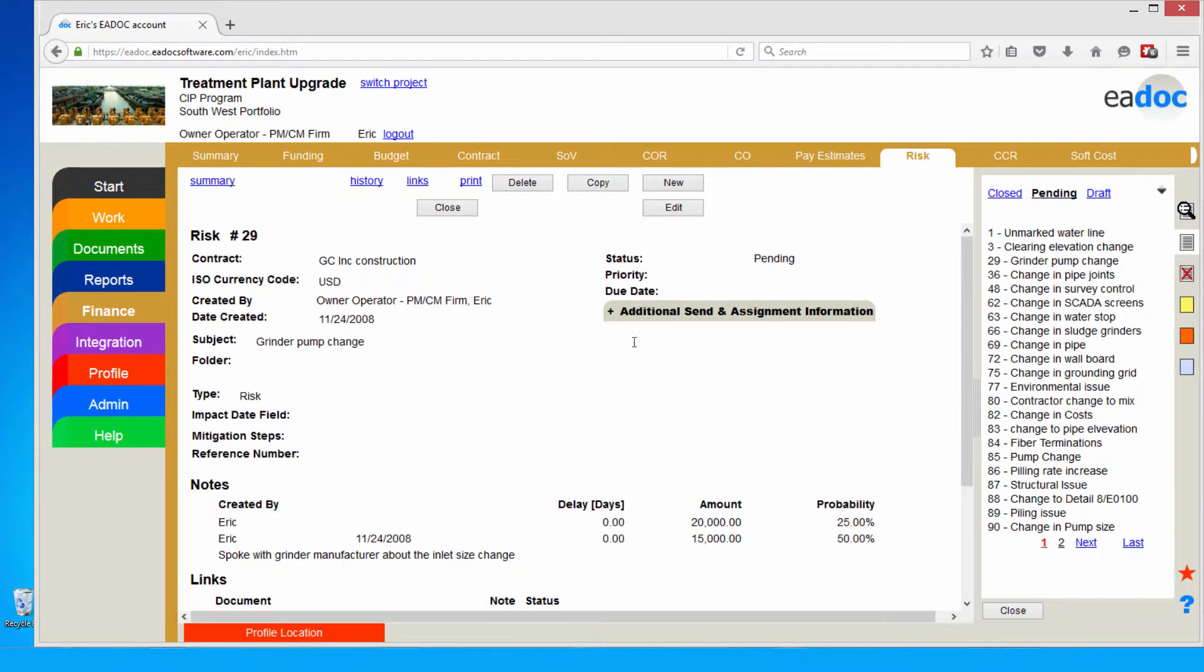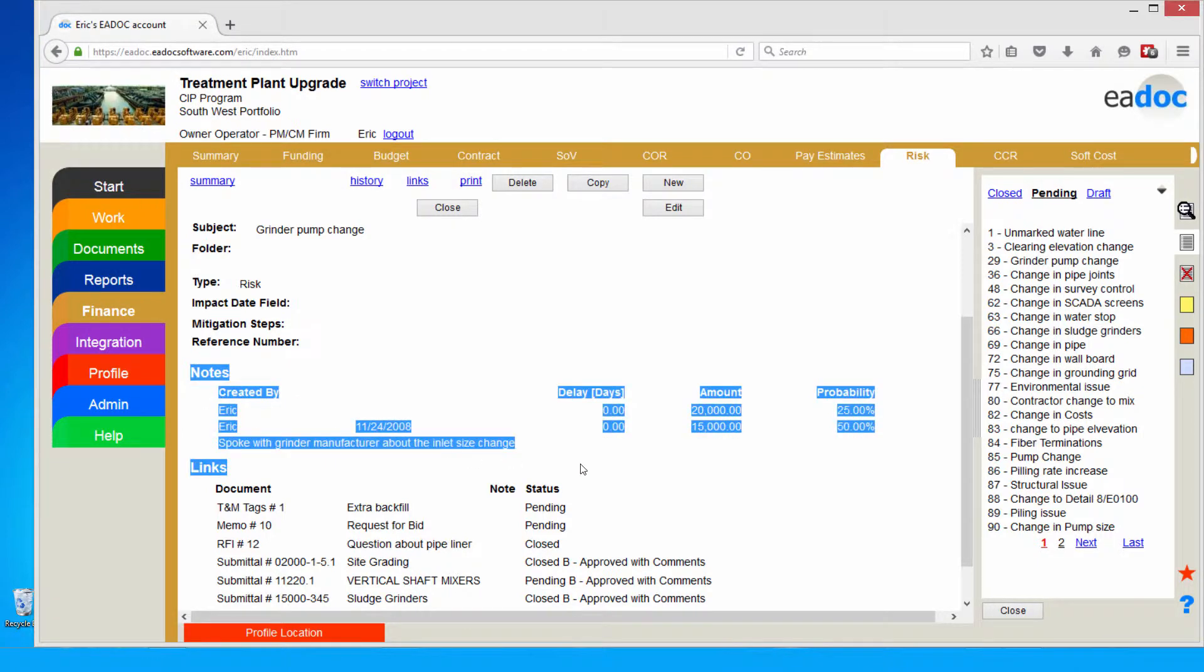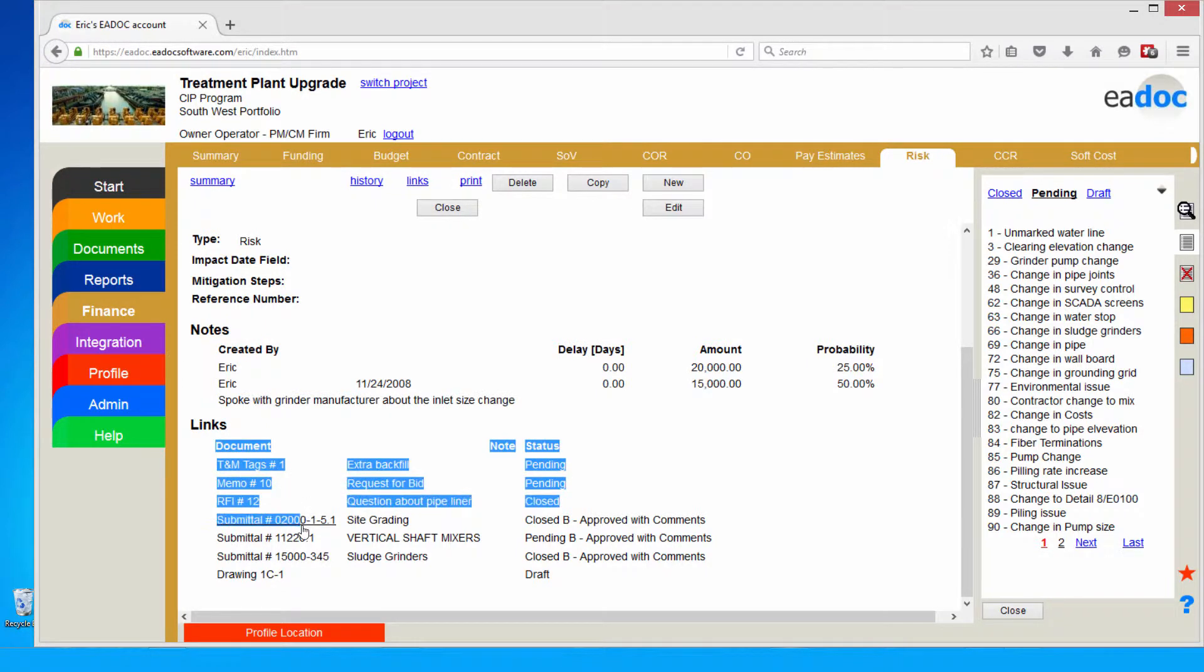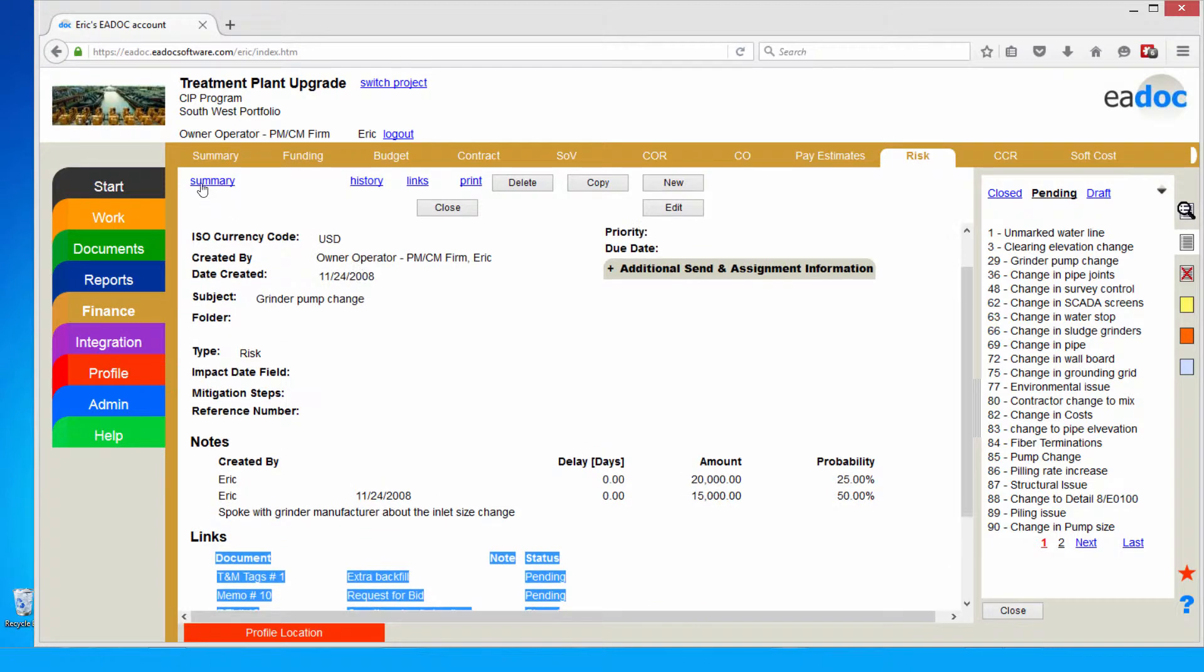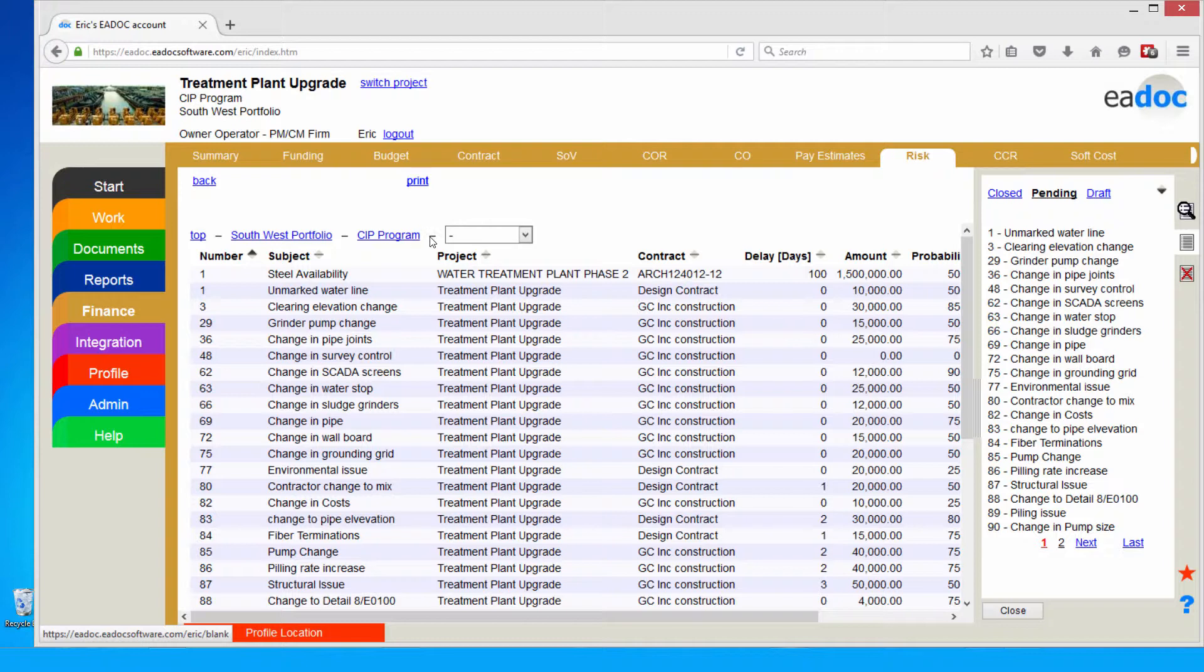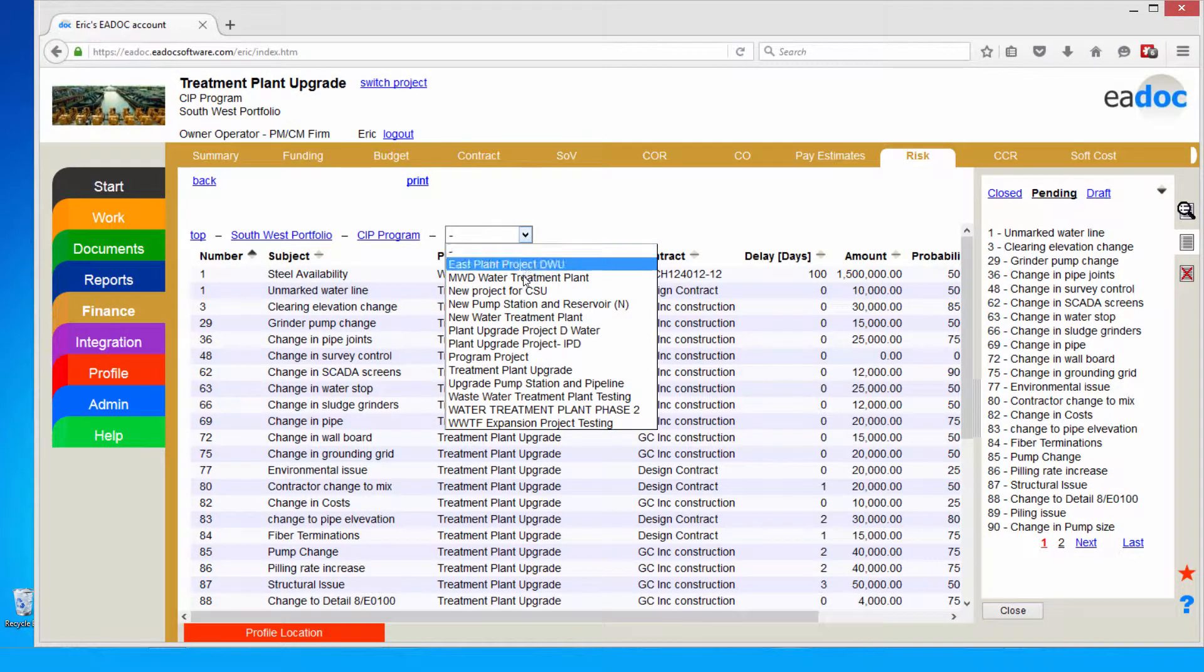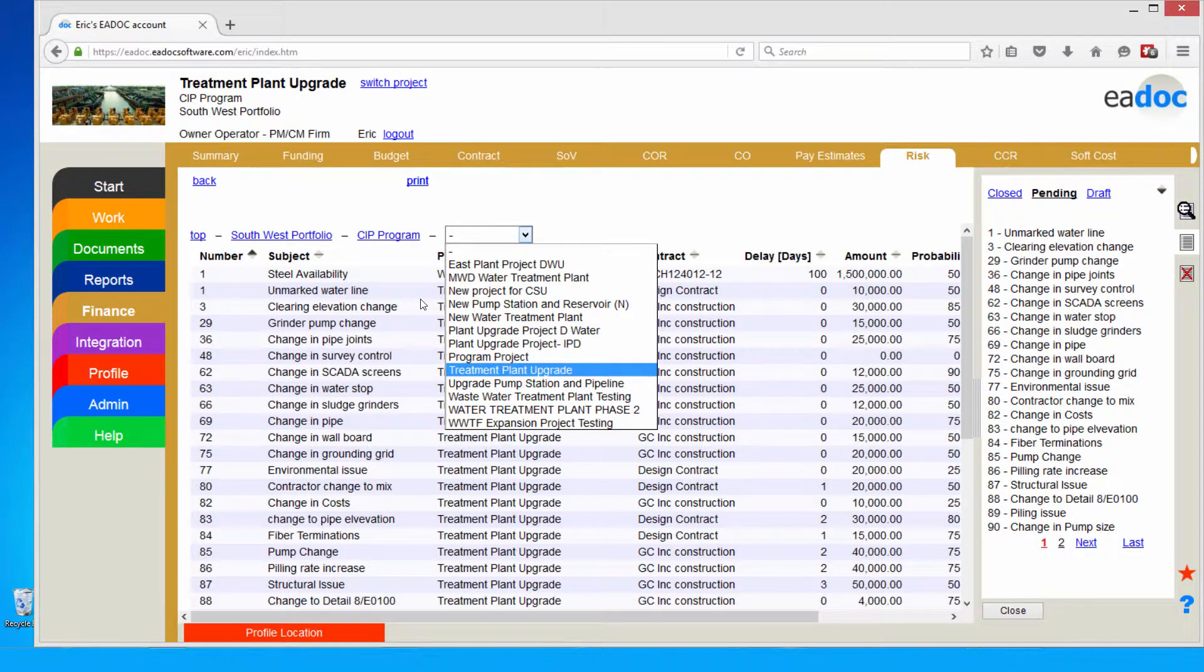Even though the submittal is going to get exchanged with multiple participants and go around for reviews and comments, only my colleagues within my organization can see this risk item. If I drill down into the risk item, this is where I can take a look at the notes. How's that risk evolved over time? I can update this as I learn more about it. I can see all the documents and communication, the letters, the RFIs, the correspondence, the drawings, all impacting this particular risk item here. It gives me a single view of that particular risk and the details. Then I can take those risks and I can roll it up into a risk register. I can take a look here at my CIP program and I can see all the risk items for this particular program where I can filter this down and say, let's just go take a look at my treatment plan upgrade.